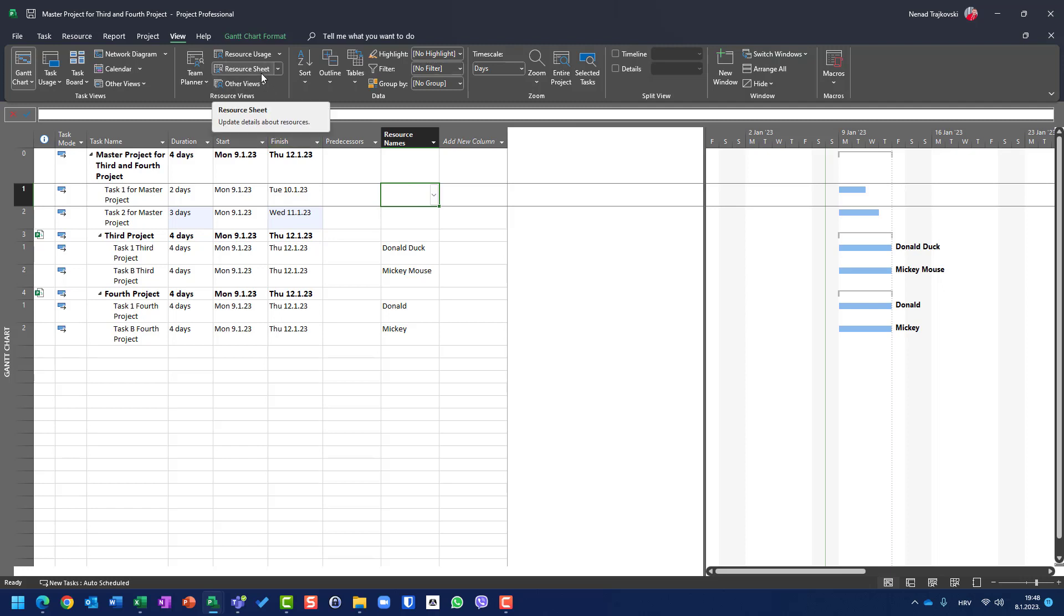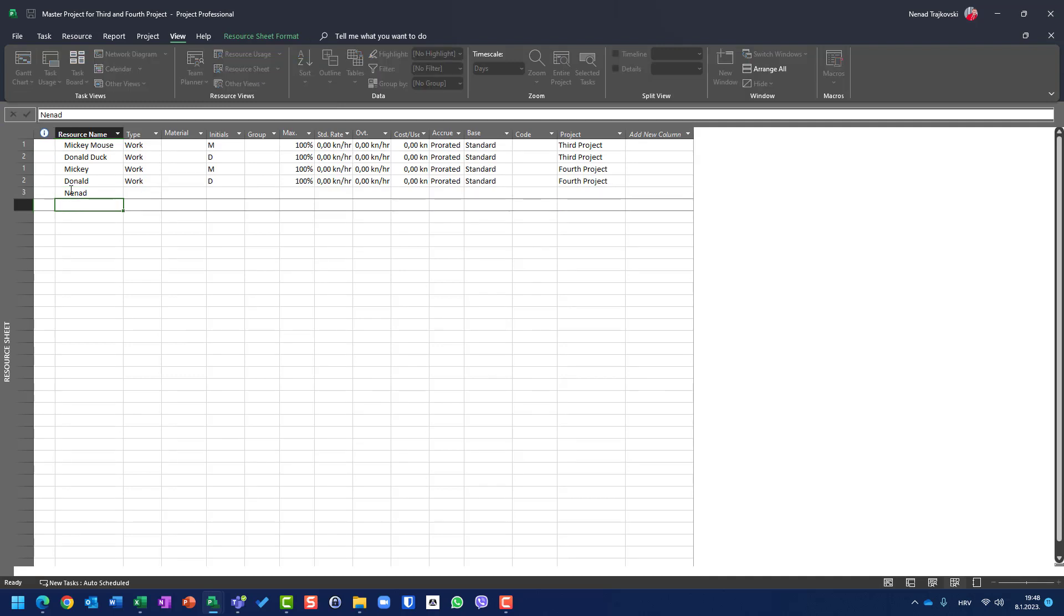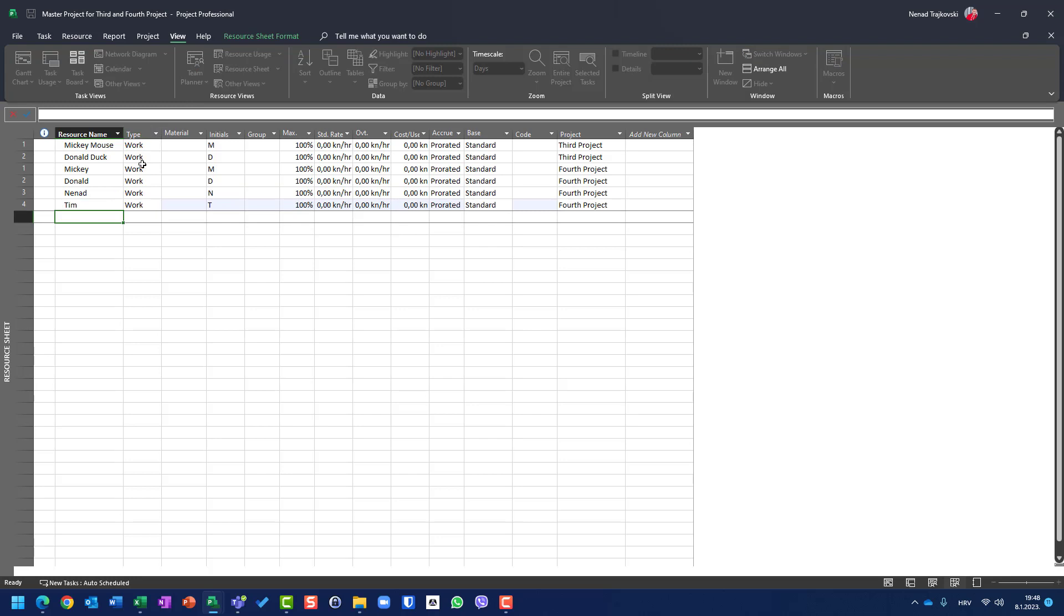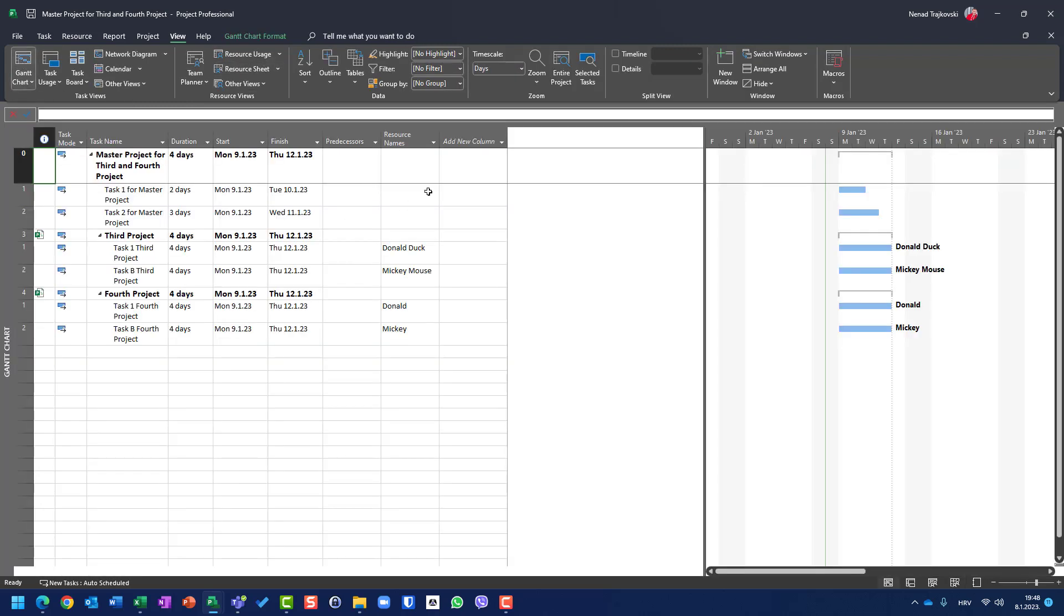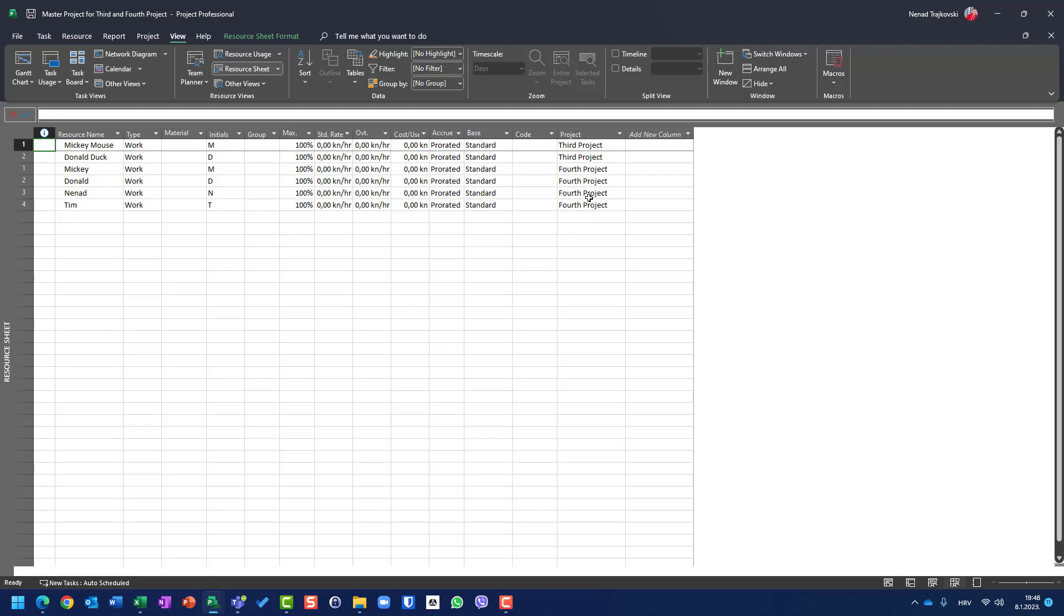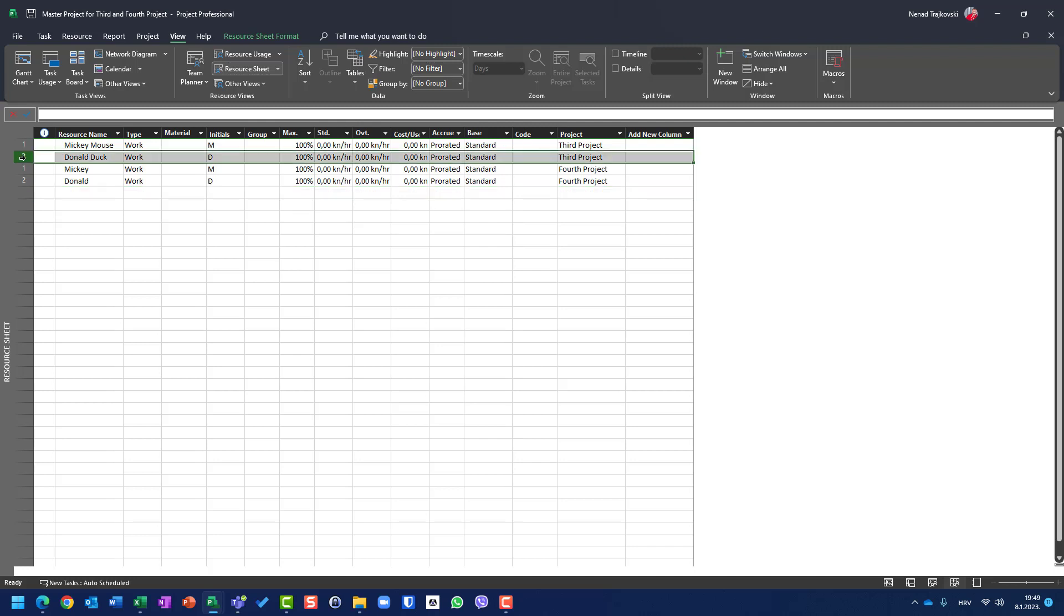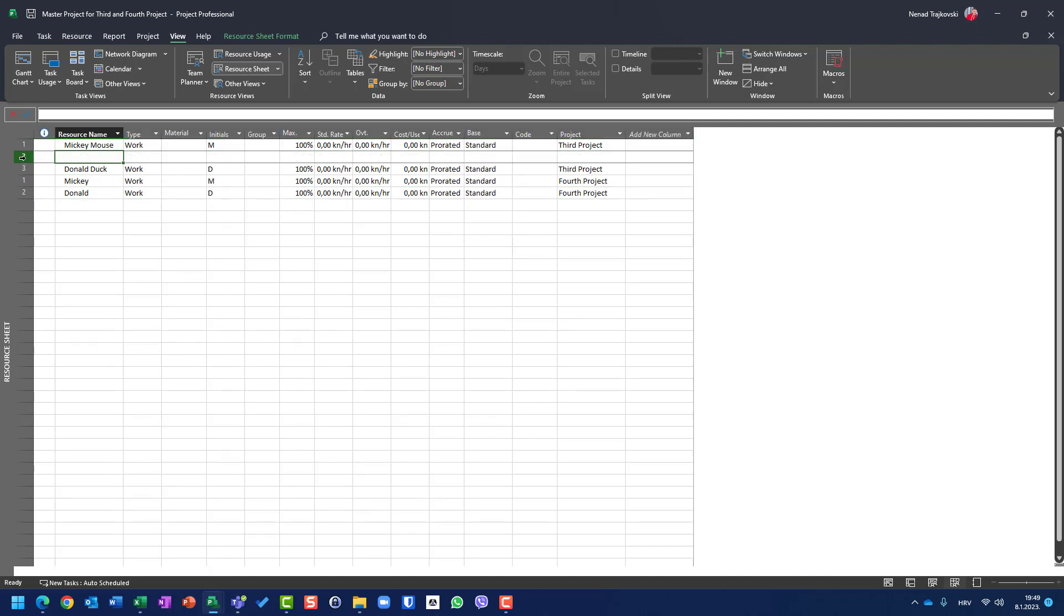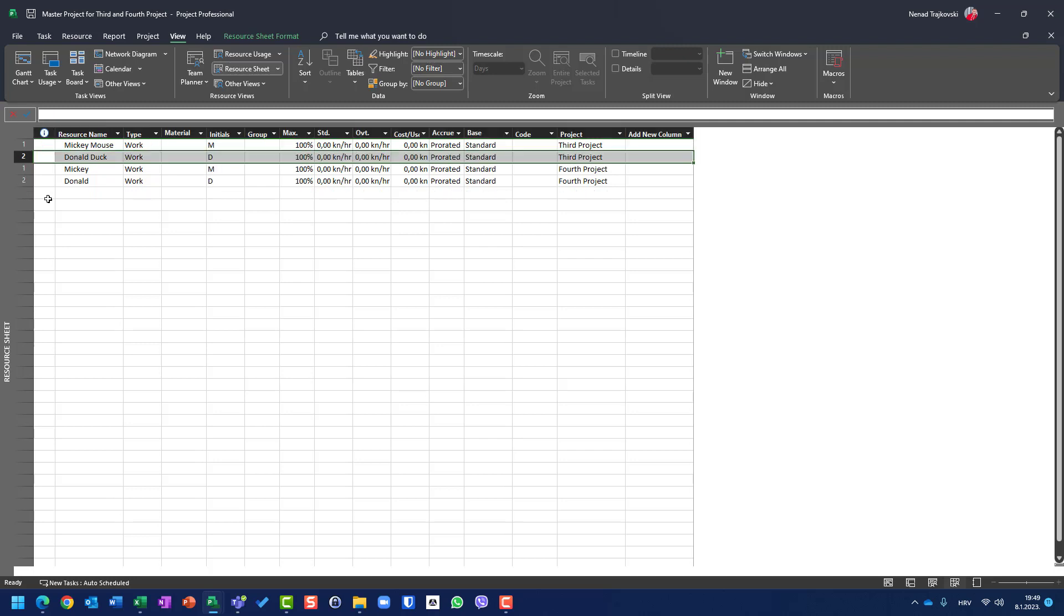If I go here and I add Nenad and Tim, and if I go to Gantt chart, I will not be able to use them because they belong to fourth project. If I go here and say insert and I put Nenad, it will belong to third project. Why? Because I am under third project. So it doesn't work that way.